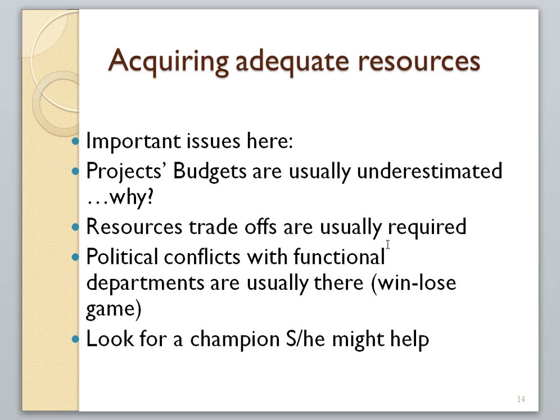In trade-offs, you do something at the expense of the other. So if you would like to speed up an activity, you need to put more money into that activity to finish it earlier. If you don't have money, that would come at the expense of the time required for finishing an activity. If you don't have money and you don't have the time, that would come at the expense of the quality of whatever you are delivering in the end, right? This is why the picture of the project manager at the very beginning of the chapter was a juggler.